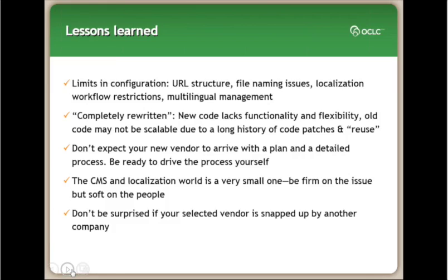Don't expect your vendor to arrive with a plan and a detailed process. You need to be ready to drive this yourself. I know there were a couple of early meetings where I felt like we were just sitting in the room staring at each other, waiting for the other group to start first. You know, where do we begin with this? What do we do first? So make sure that you have your list of requirements, what your priorities are as far as implementation, and you can lead off that meeting and say, here's what we want to tackle first.